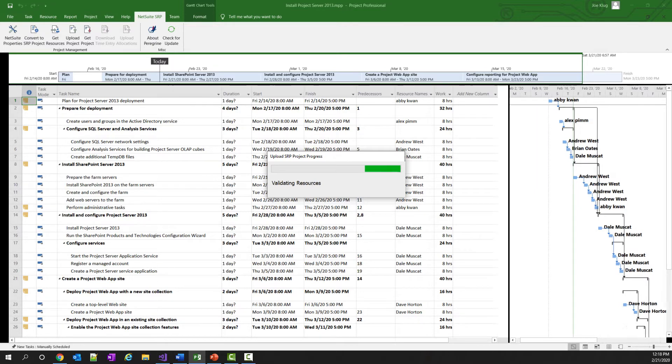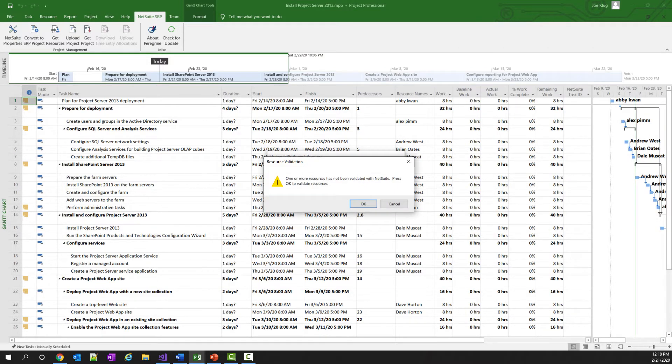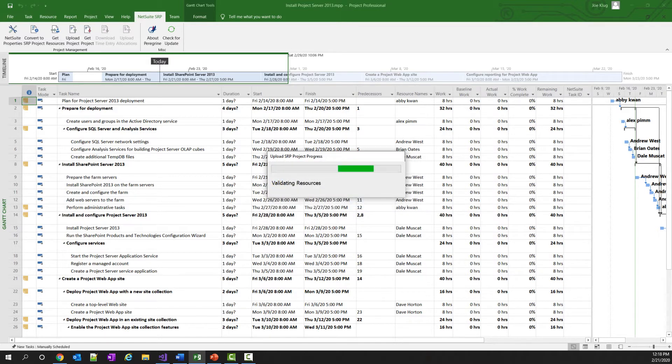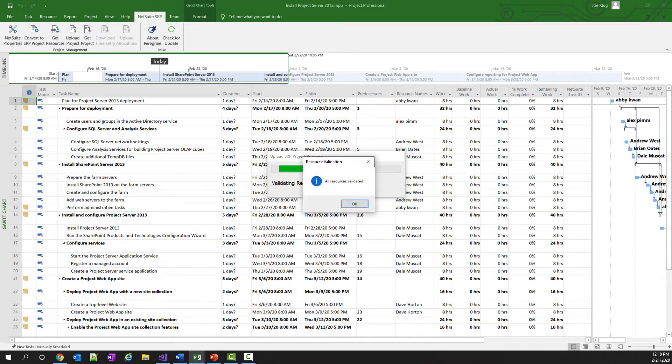The next thing that the add-in will do is it will try to validate all of the resources that have been assigned to Project Task. It does this because it wants to make sure that when you're adding the task to NetSuite that the resources can also be assigned to those tasks. So I just got a dialog that tells me that some of them haven't been validated, and to click OK to continue. So I click the OK button, and it's going to take each one of these resources and validate that they actually exist in NetSuite. And shortly here, there we go, I'll get a dialog that says that they've all been validated.